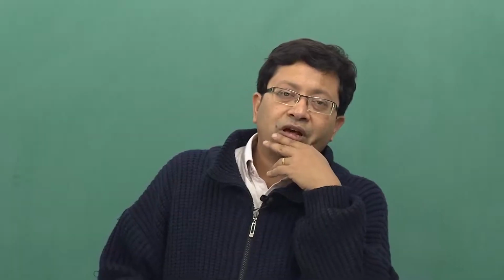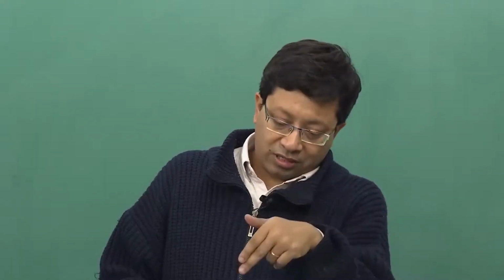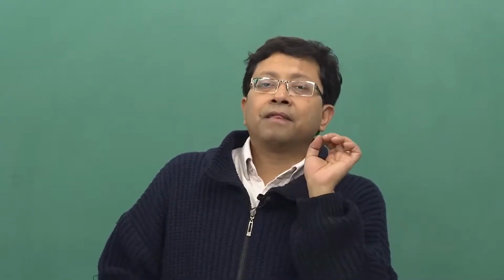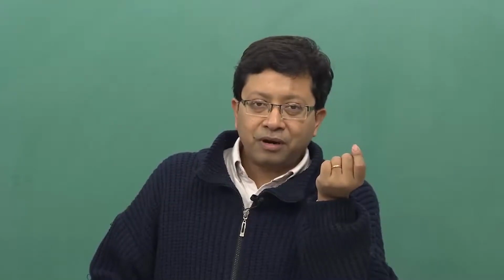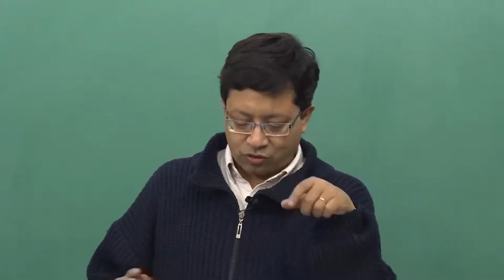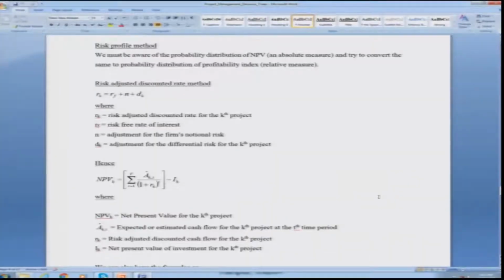So, consider the problem for the moped, the decision tree analysis problem which we did for a company trying to start with the moped, just before the oil drilling example. There you had a time period of 20 years for 20 million per year and 30 million per year, and the interest rate was 12%. So, that interest rate RK, suffix K, is 12, it may change from project to project. So, this whole formula is exactly the same as what we have done in that problem.